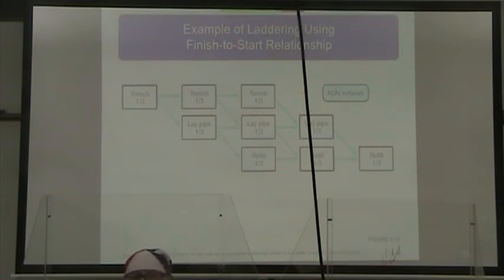When that's done, they can dig the last part of the trench while they're laying 1/3 of a mile of pipe and refilling the 1/3 where we've already laid the pipe.